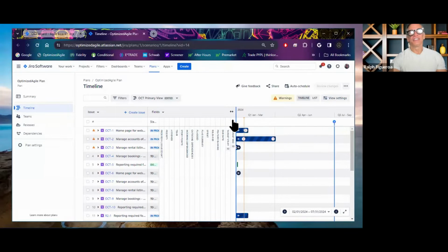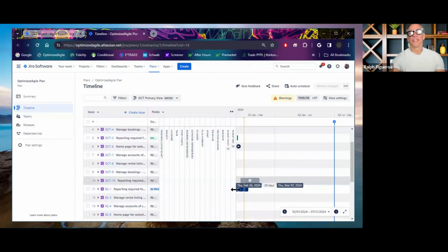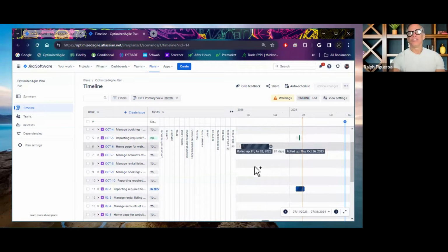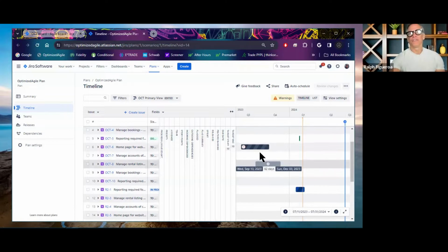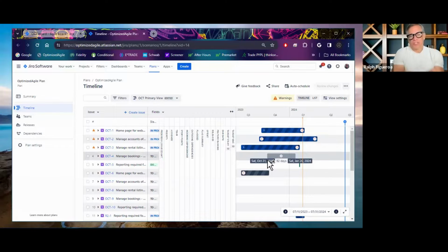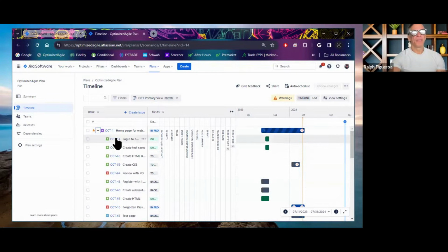So all these Gantt charts, the groovy looking Gantt chart view that you see up here, you don't have to manually enter in order to populate this information. Jira Advanced Roadmap is smart enough to just grab it based not on the epic, but the stories as they relate to the sprints that they are assigned to, which is kind of cool.